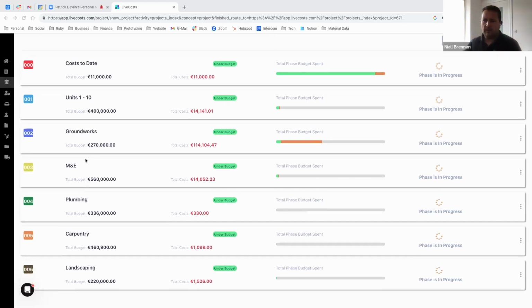The only part where it might get slightly strange is, the example I would have would be the likes of plastering, for example, or painting is another one. You're creating budgets for, let's say, the roof, and in the bill of quantities that may contain plastering elements, like plasterboarding, skimming, whatever it might be, and equally it may contain painting. But that's really not how things happen on site.